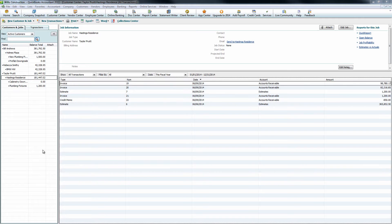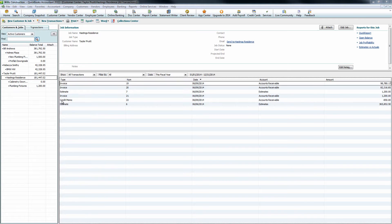Before you can start with the application for payment, you do need to ensure that you have at least one estimate and one invoice in your customer job in QuickBooks. In this case we do have multiple invoices as well as our main estimate from Construction Suite, a change order estimate from Construction Suite, and a credit memo that's the result of a negative change order within Construction Suite.